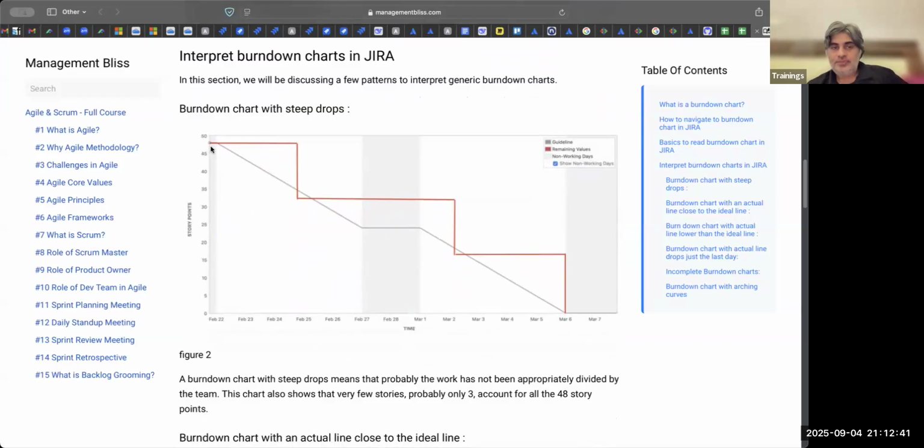Okay, so if you look at this, day one, 48 points to burn. This is a very simple looking chart, but it tells me a lot about stories. On day 1, day 2, day 3. On day 3, they closed the story. So from 48 till about 32 or something. They closed probably a 13 pointer or something.